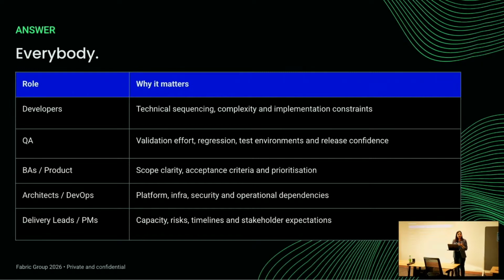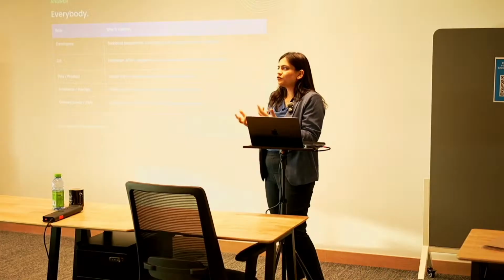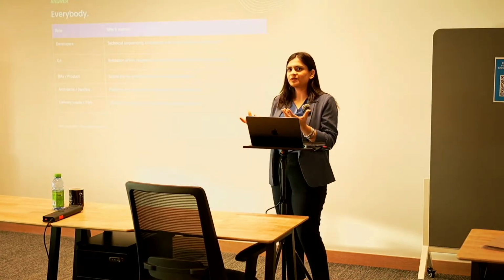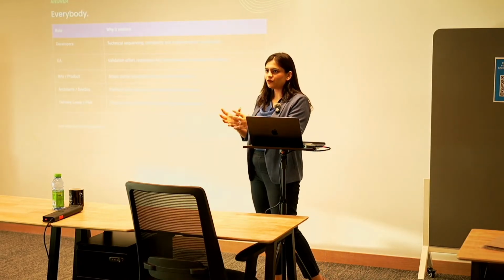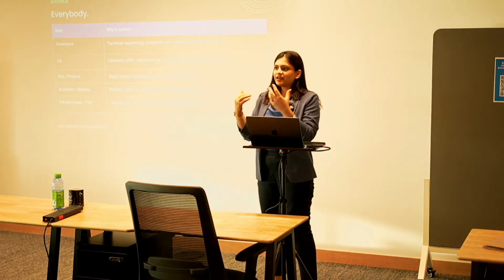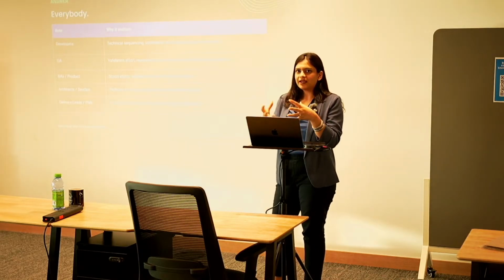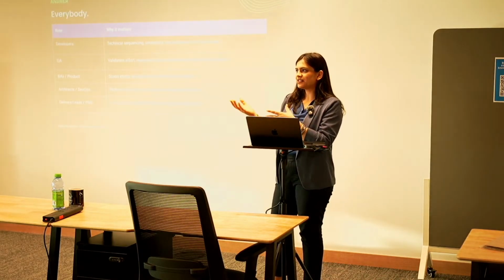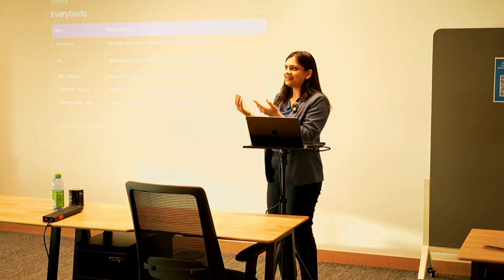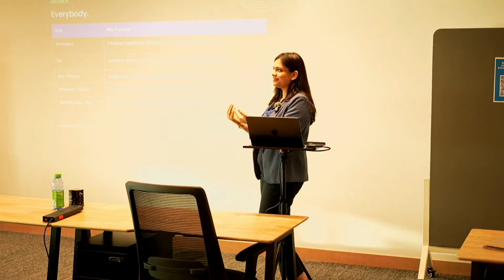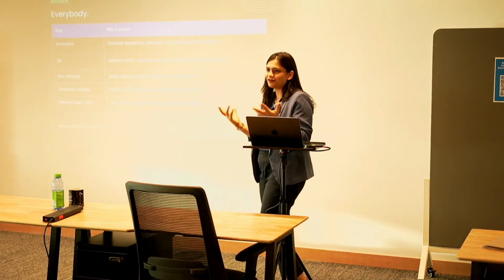But in my opinion, even if I've had two or three senior devs coming together and working, who are in sync about the problem statement and understand what they need to achieve and how, it's usually not a problem. In fact, it gives me more pointers as to whether we are estimating things in the right manner or not. If we are taking an epic, the lead could say it's a 3-pointer, but the work has to be done by a bunch of developers, and they come and argue that it cannot be a 3-point, I think it's a 5, for example.